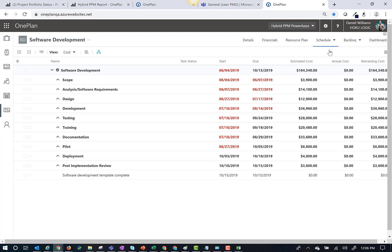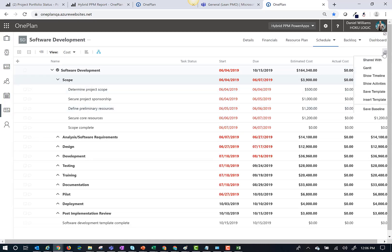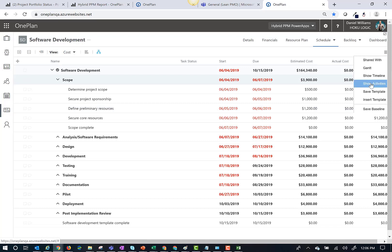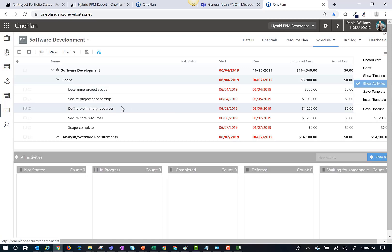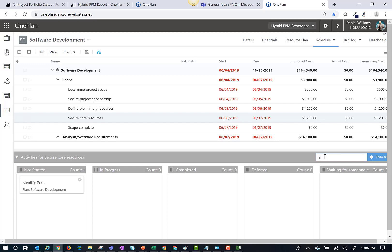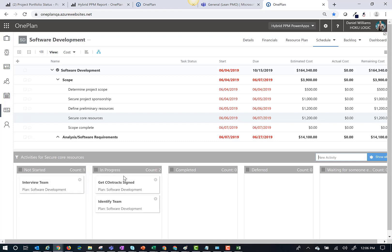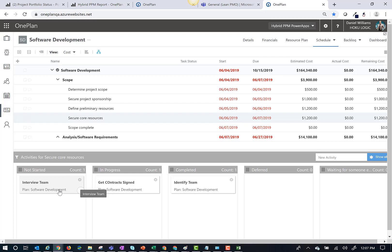OnePlan has the ability to combine scheduled tasks and a board of activities for true hybrid project management. I simply select a task and enter a list of activities that need to get done within the task. After I create my activities, I can simply status them by dragging and dropping them in the correct status.